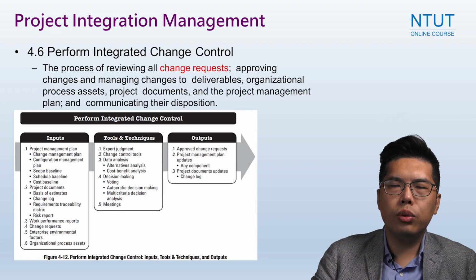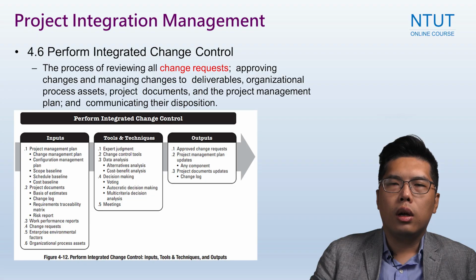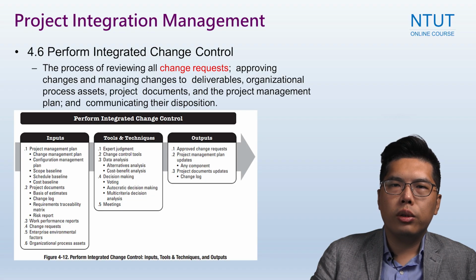The change control tools in this context do not mean the change control board alone, but also the tools used. Let's say a change request is approved, or the change is rejected, it gets recorded in the project document called the change log.